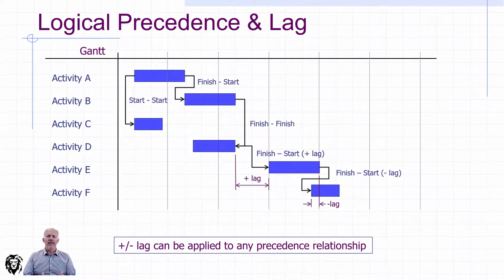But it's now appreciating it and learning to harness it. And probably the biggest challenge to harnessing it is to disassociate yourself from your biases and preconceptions and not forcing a relationship that doesn't actually exist. It only exists in your mind rather than in the physical reality. And sometimes that can be challenging to get to. I can think of one example where somebody might assume that your underground utilities have to be done before you do your foundation. And that's normally true and certainly makes a whole lot of sense, but it's not a physical requirement depending on the method that you choose. And so it can get challenging to step outside of your preconceptions to make sure that you're not over-constraining yourself beyond the actual physical limitations.